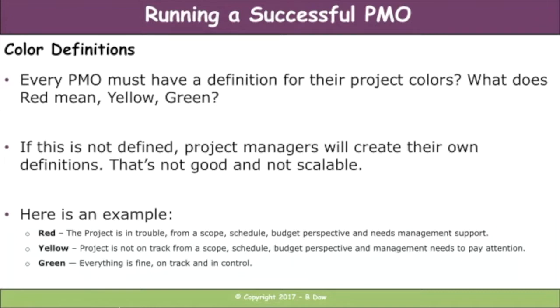And you're going to want every program and every project manager to abide by those color definitions. You can, of course, refine it and mature it and get way better in this process. But at this point, you're going to want to define it at least at the minimum so everyone is driving the same red, same yellow, and green expectations. Can't stress enough how important it is for everyone to be using color definitions the same way, especially if you've got multiple projects working with a single customer and one project manager comes to that customer with a red condition and another one comes with a different red condition. So I made it number 1 on the list because it is one of the most important things to set up. And it's one of the things that we all blow and we all have trouble with.